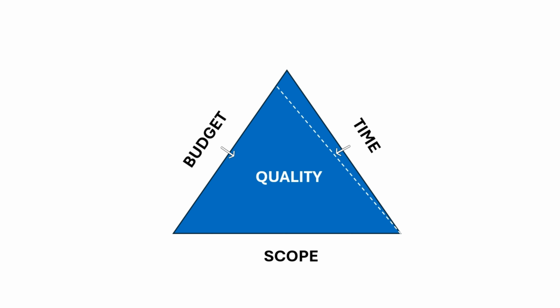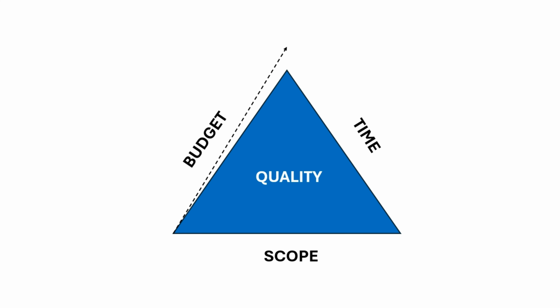If we lower the budget of the project and stay with the same scope, then also we will get lower quality. And another option: if the scope is given and we would like to increase quality, then we should assume that budget and duration are to be increased. So we would like to present it somehow like this. Okay?